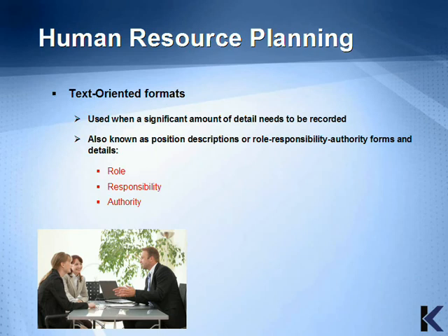When a significant amount of detail is needed to describe roles and responsibilities, a text-oriented format can be used. It's also known as a position description or role responsibility authority form, and it details the role, the responsibility, and the amount of authority that a particular position has.